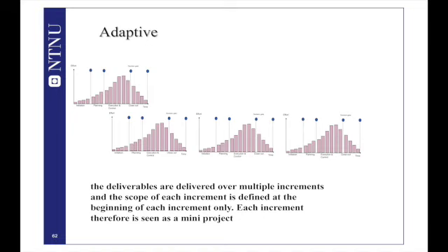But of course, it again has lots of limitations. One limitation I can come up with now is what type of work you do. If you are talking about software planning, digitalization efforts, research or study efforts, then this adaptive approach might be possible because you are not producing any physical deliverables.